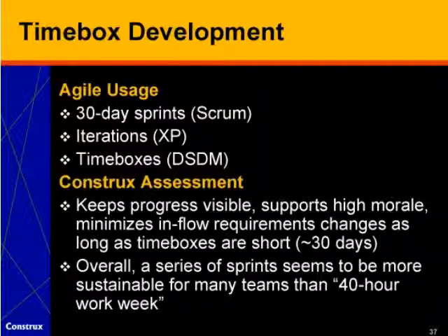It minimizes inflow requirements changes because it's very reasonable to say, hey, we've only got 30 days. We just talked about the requirements. We'll talk about additional changes after the iteration is over. And that's reasonable when your time boxes are short. It becomes a lot less reasonable when your development increments are 6 months or 12 months or something like that. And so what we've seen is that it appears to us that a series of sprints seem to be more sustainable for many teams than a straight 40-hour work week. That is, a lot of people seem to like the ebb and flow of working hard and then kind of relaxing for a short time and then working hard again.